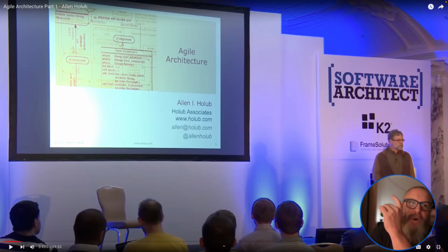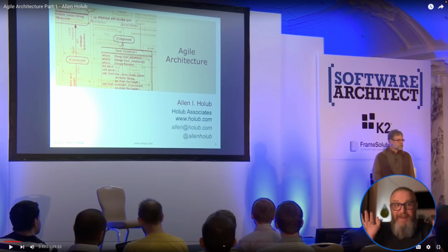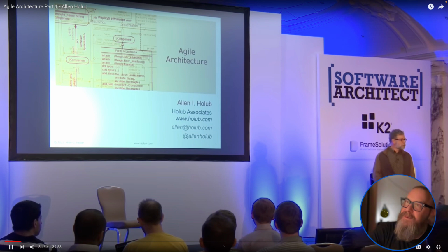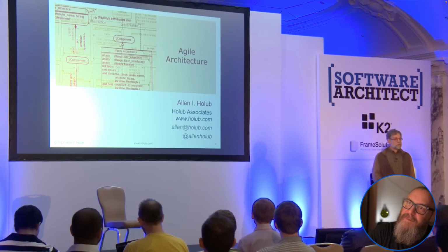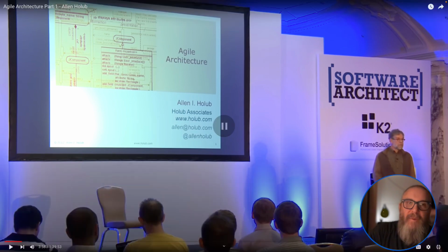So you're doing a little workflow, and you're just doing the bare minimum of that thing, just to get it out there. It's like, "Could you mean like this?" And then people go, "No, we didn't mean that," because you don't know what they want until you show it to them. That's just human nature. At which point you actually release it to your users. You'll get feedback from your users, ideally immediately or close to it, and then you incorporate that feedback into the product immediately. So you can't plan super hardcore in advance, but you're still going to have a plan. You're still going to have a direction.